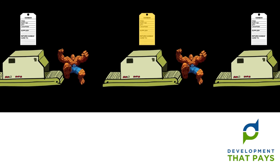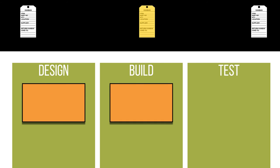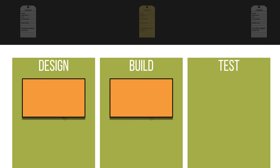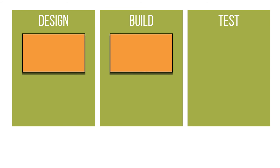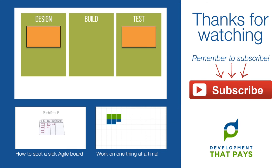If we now think about a Kanban board as used in software development — the processes are the columns, the things are the tickets. The Kanban cards are nowhere to be seen. Have we thrown the baby out with the bathwater? Not quite. The Kanban cards are with us in spirit, if not in body. The important part of the Kanban system is the signalling, and we do have signalling. For example, this column signals its need for another ticket by virtue of its emptiness — very much like the empty space on the supermarket shelf.